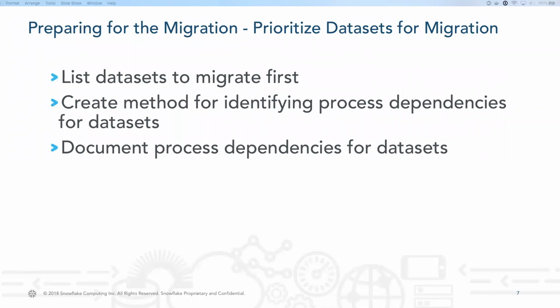The ideal candidates for starting the migration combine providing value to the business and minimal migration effort. Rather than starting with the most complex data sets, begin with a simpler data set that provides a quick win and establishes a foundation through the development and deployment processes to build the rest of the migration from.